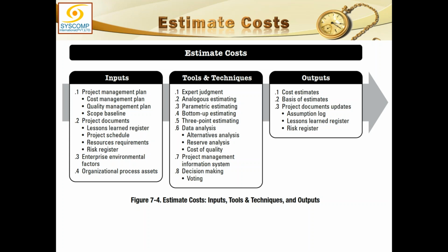This 2400 rupees includes the cost of everything, right? And if you are going for even better, maybe it is 3000 rupees per square foot. So that is a parametric estimate. And once you multiply it with your covered area, it becomes your parametric estimate.